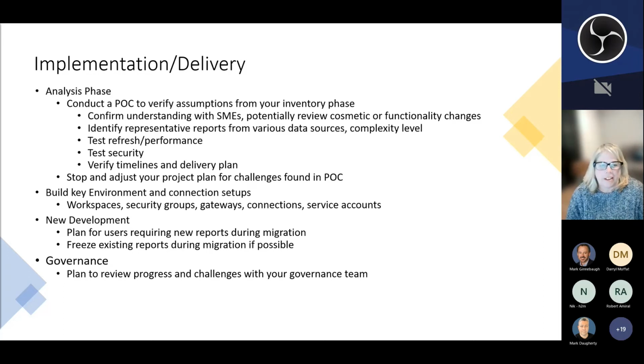And then super important, easy to forget, right? But you don't want to start migrating 20 reports and have that development team still working on those reports, making changes, making upgrades, what have you. You're not going to have any success trying to move a moving target, right? So definitely plan. Ideally, that's why I recommend grouping your reports so that you don't take everybody out at once. Maybe this group says, I know I can't do any new reporting for this period of time, right? That's ideally how you approach it. So freezing those existing reports.